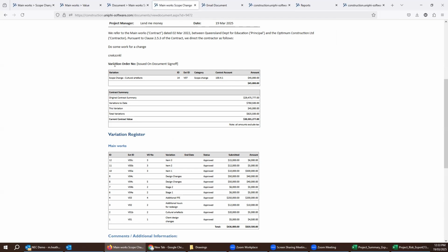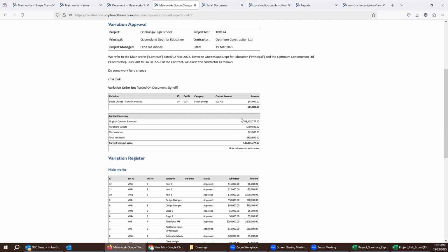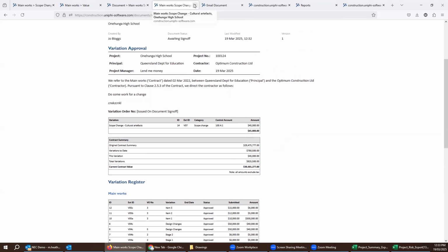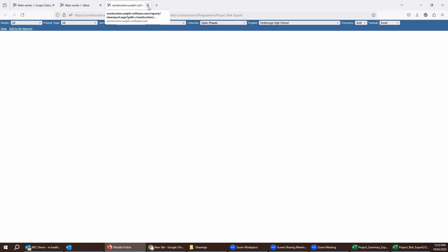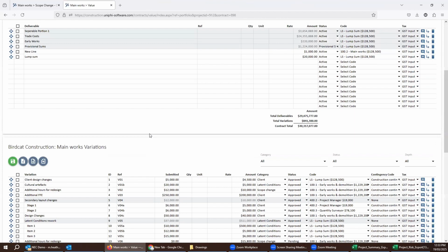And you can say, I actually don't want this variation order number to display at all, and all this other stuff. But if you do display our standard contract sum, one of the benefits of UniPhi is the fact that it's calculating the adjusted contract sum. It's calculating the previously claimed value for you automatically when you're doing the certificates for progress claims, and hence there's less likely to be copy paste errors or Excel errors when generating this information. All right, so that becomes a bit of a rinse and repeat in all parts of contract administration.